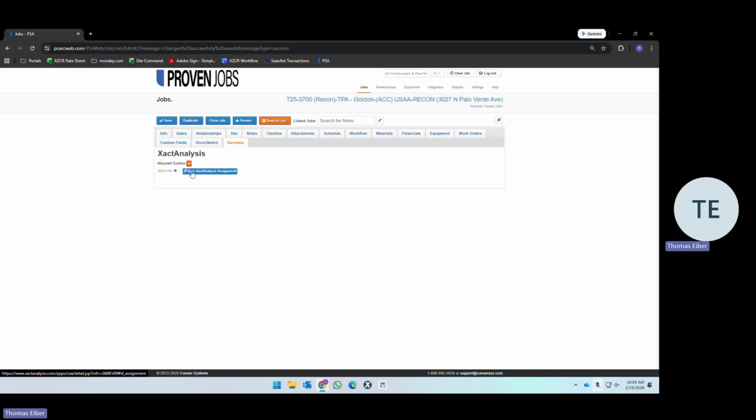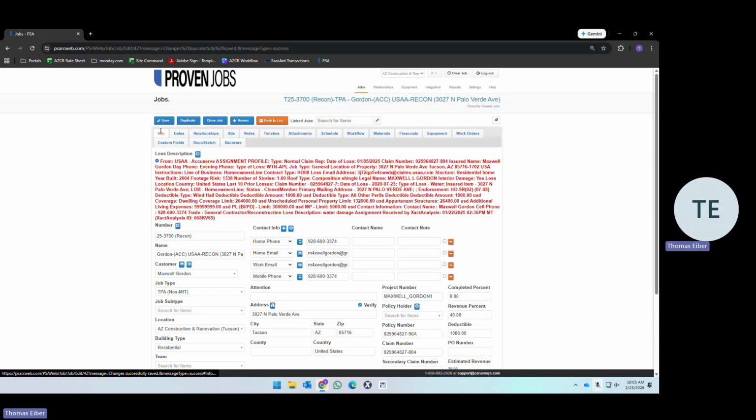The key data you'll be interacting with in the PSA: approving jobs, PM assignments. As soon as you receive a job, you should think about who you're going to assign it to, assign it, and then call to schedule the pre-con. You shouldn't waste any time. That is an immediate request. As soon as you get an ATP, assign a PM, schedule the pre-con meeting, the pre-con walk, and pass it on to them. Once you add that date, they'll get notified.